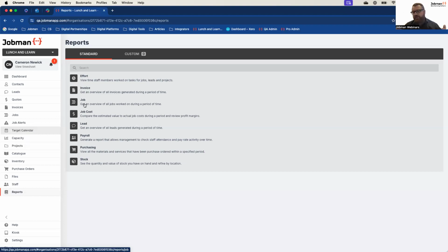Job reporting is the generalized reporting for job information. So this is like work in progress reports, areas in which you can see overall statuses. How many jobs do we have in status X during this period that we can be looking to close out? So if your critical date for your operation or your business is dispatch or install, you'll probably want to build a custom work in progress filter for your jobs to allow it to then quickly run that report each week and say, okay, how many jobs do we have going out this week? I mean, that's the ultimate. The more jobs we have going out that are complete and heading towards that area, that's when we get paid. So very important. But there are a lot of use cases for the job work in progress reports.